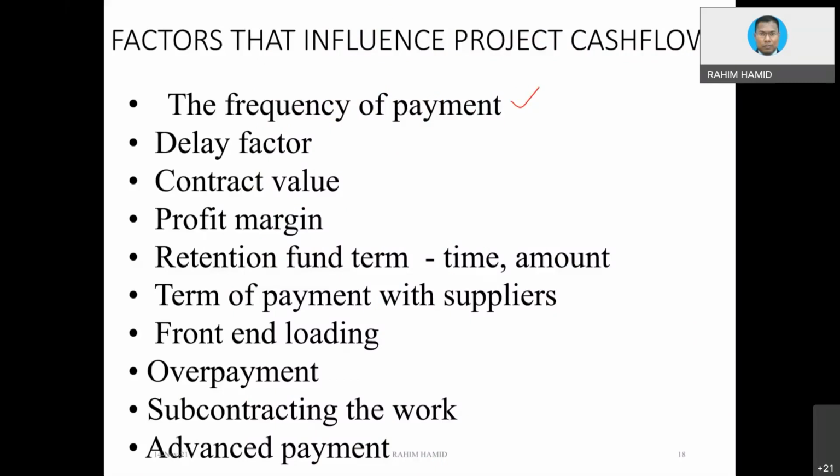But oftentimes, even though they say it is on a monthly basis, sometimes the payment could be extended until 45 days or even 2 months. That is the issue. Delay factors in terms of processing would be an issue, or delay factors such as the COVID situation. For sure, you are not getting any money from the project because you simply cannot do the project.